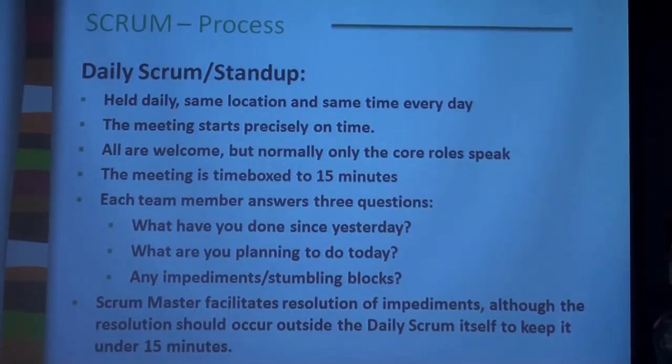To help us understand the progress and to build the burn down chart, Scrum methodology assumes the team will have daily meetings. And those meetings are called stand-ups. They are held daily, same location, same time. It can be 10 a.m., 11 a.m., 2 p.m. There are no standards. The time should be convenient for all the team members.